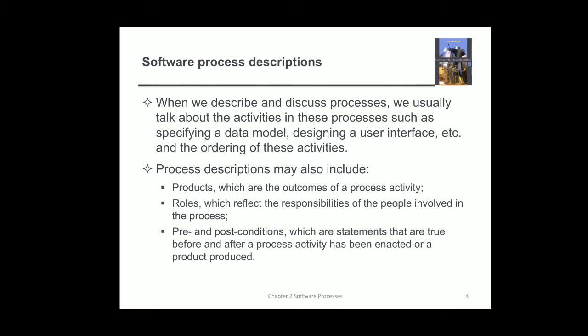Then we have pre and post conditions, which are statements that are true before and after a process activity has been enacted or a product produced. For example, before architectural design begins, a precondition may be that all requirements have been approved by the customer. So that is a precondition that we look at when we have an architectural design. That is, before actually starting architectural design, we check the precondition.